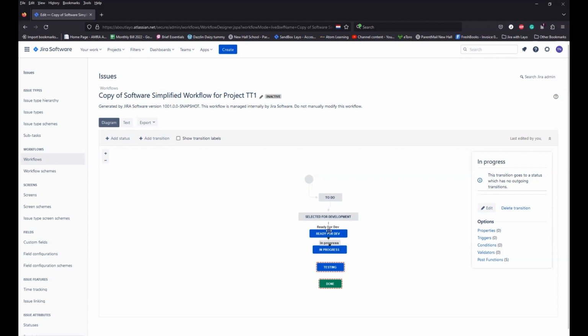Okay. And the transition in itself needs to be done because once you want to put controls or conditions or validators in place, you need those transitions in place. What you do not want to do is, when you put in validators as an example, you're trying to make a certain step or a certain field a required field to be populated at a stage. If you've applied that at any of the transitions, then you're causing a problem, because the team will probably not be able to create or edit that ticket because you've mandated it.